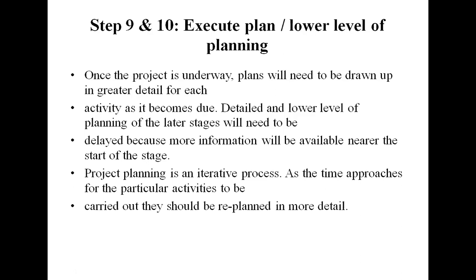Once the project is underway, a plan will need to be drawn up in greater detail for each activity as it becomes due. Detailed, lower-level planning of the later stages will need to be delayed because more information will be available near the start of the stage. So project planning is an iterative process. As the time approaches for particular activities to be carried out, they should be replanned in more detail.